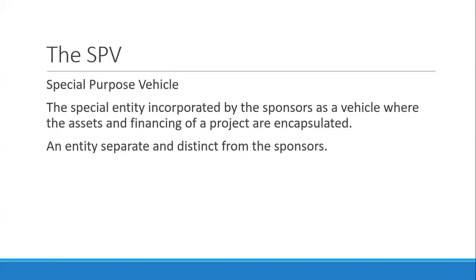The SPV, or special purpose vehicle, is the entity where the assets and financing of a project are encapsulated. It is a separate and distinct entity from sponsors. The objective of putting a project in an SPV is to limit the risk of the project within the entity and to isolate risks, using the SPV as a way to allocate risk between different parties.